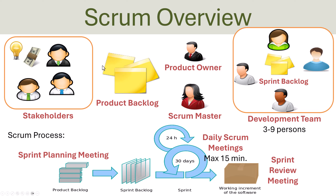Then we have the product backlog, which is basically a list of all the requirements that should be implemented in the software. When the project starts, the team begins working in so-called sprints. A sprint can last from one to four weeks. When a sprint starts, they have a sprint planning meeting where they select some items from the product backlog, put them in a task board, and work on those items until the sprint is finished. At the end of the sprint, they have a sprint review meeting where the team goes through all the work done in that sprint.